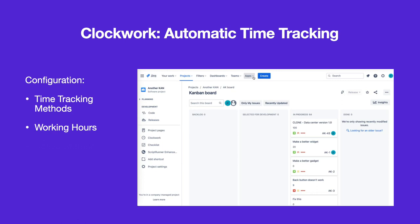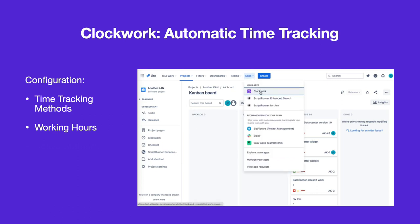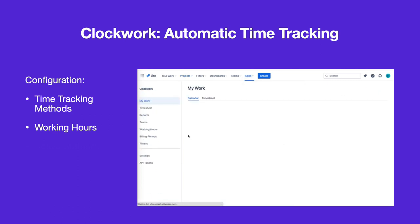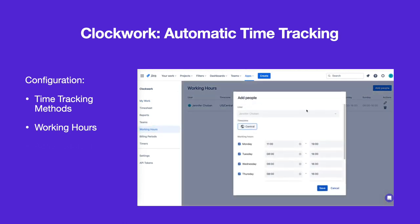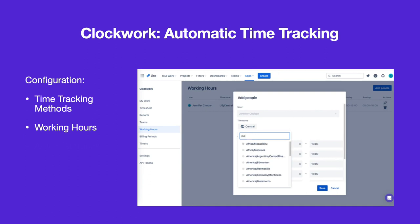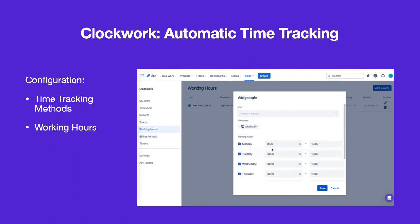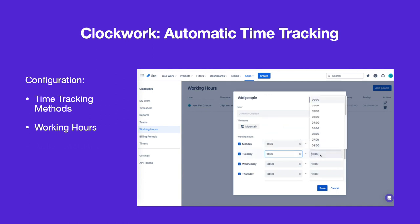A user can configure their individual working hours by going to Apps > Clockwork and selecting Working Hours from the left navbar. Click on the pencil icon to edit the configured hours. Select the time zone, input the working hours, and click Save.